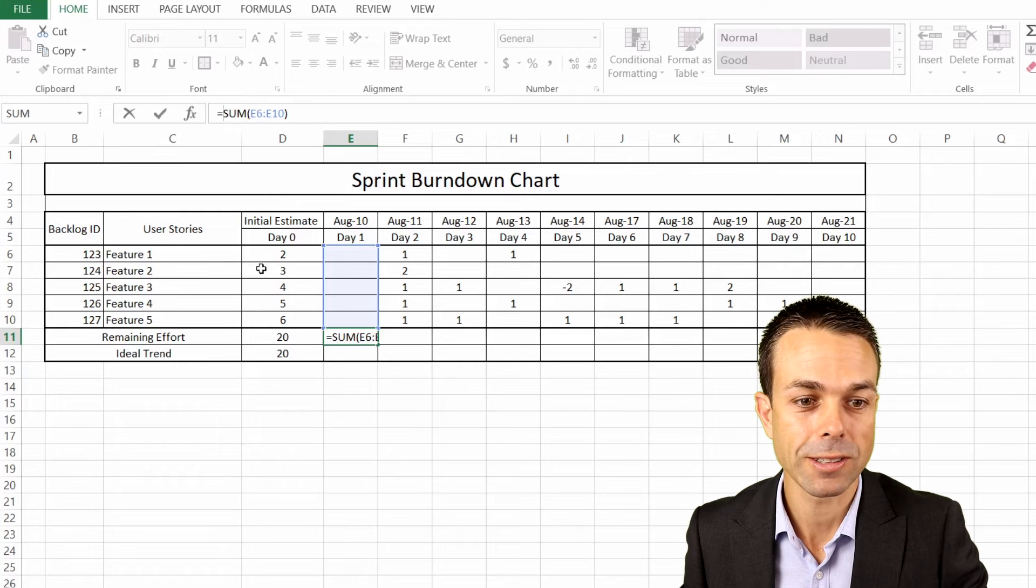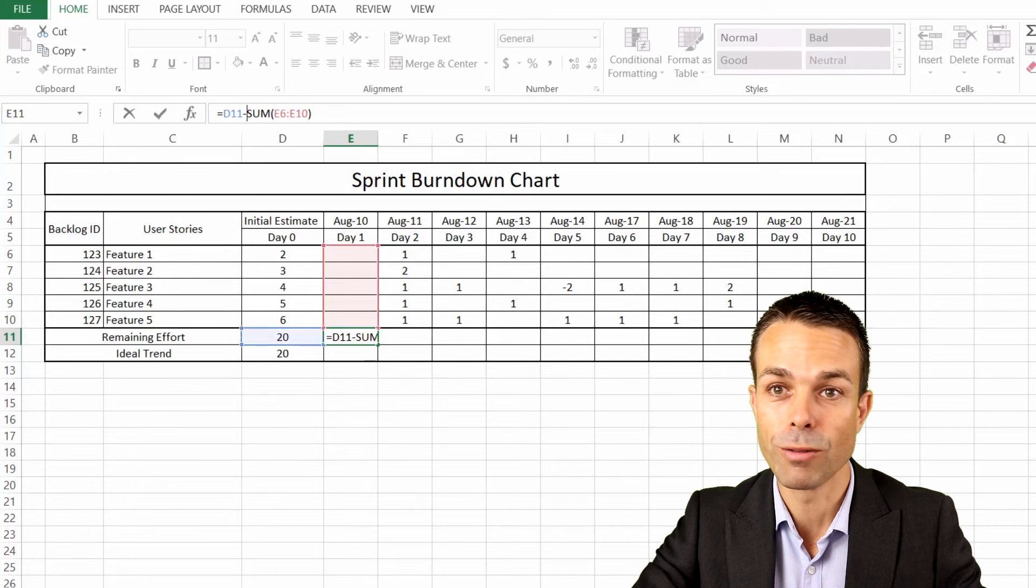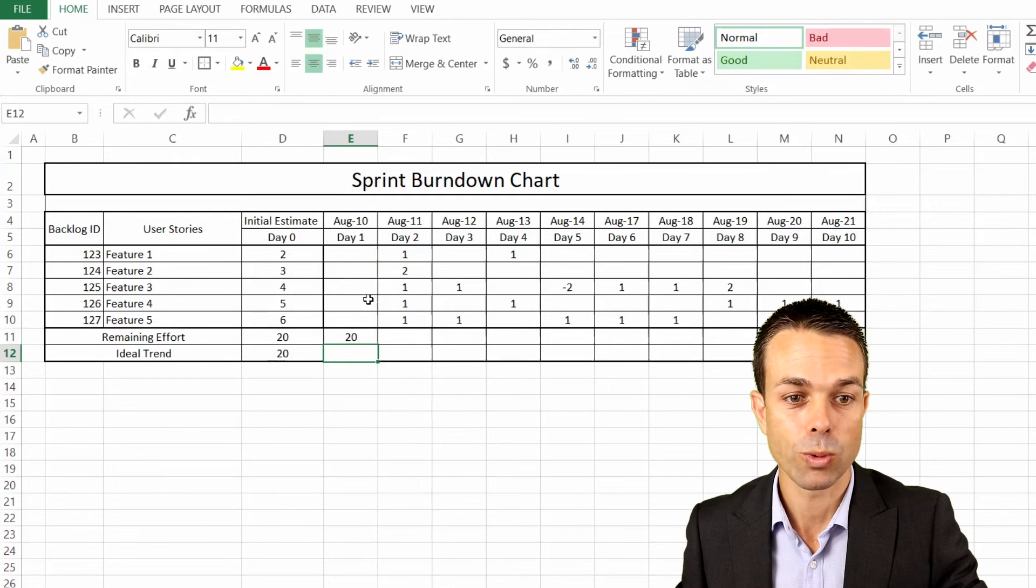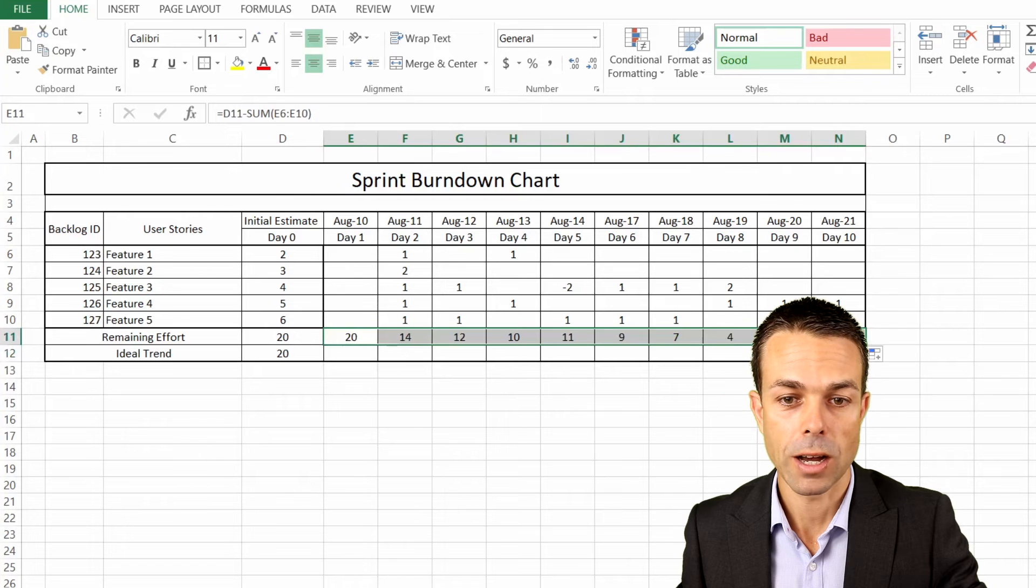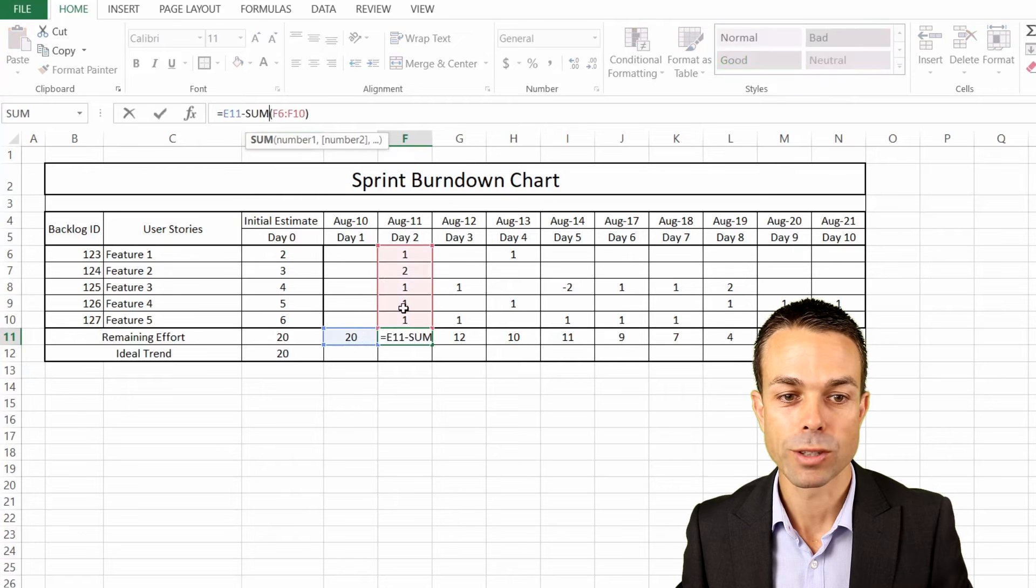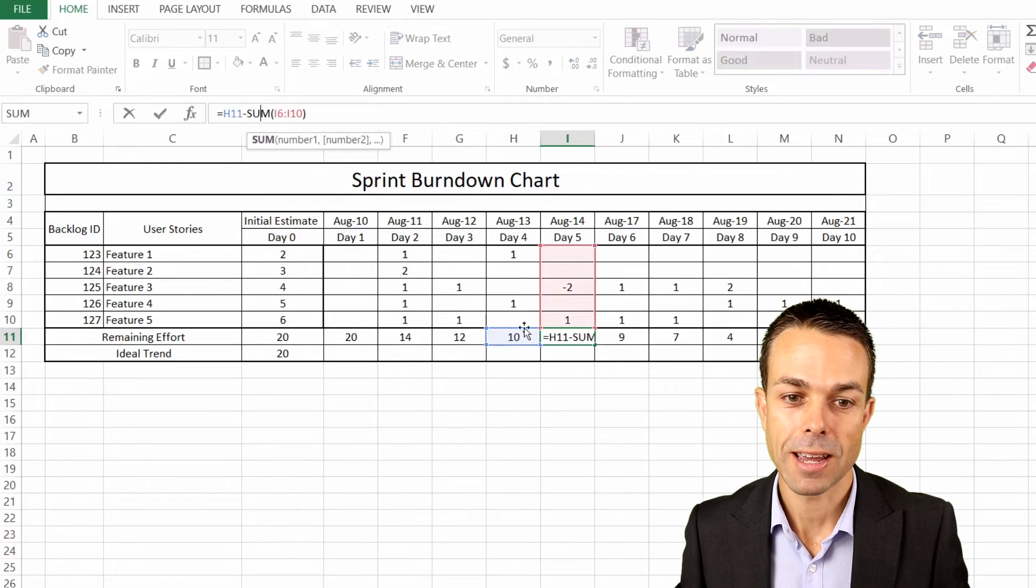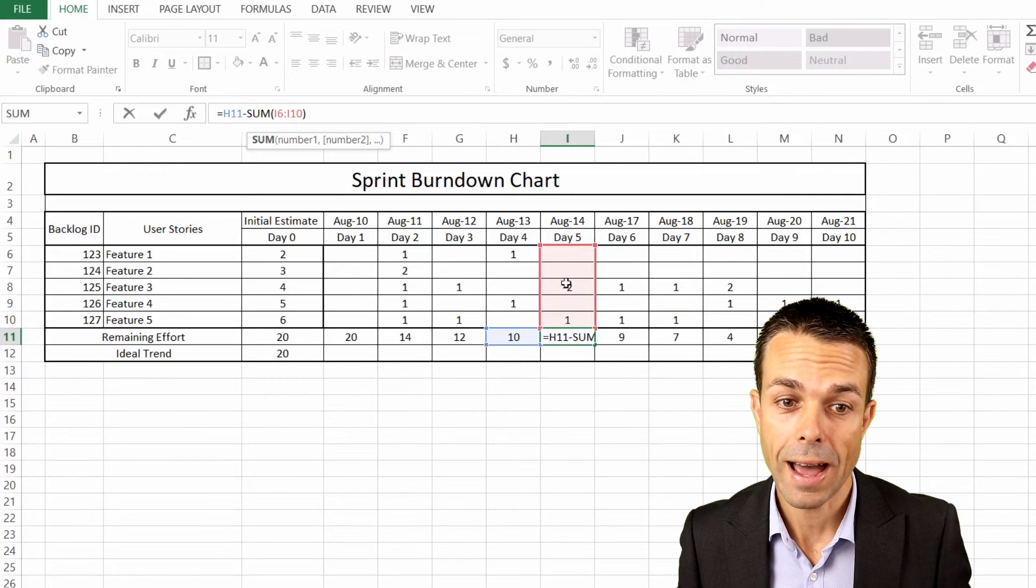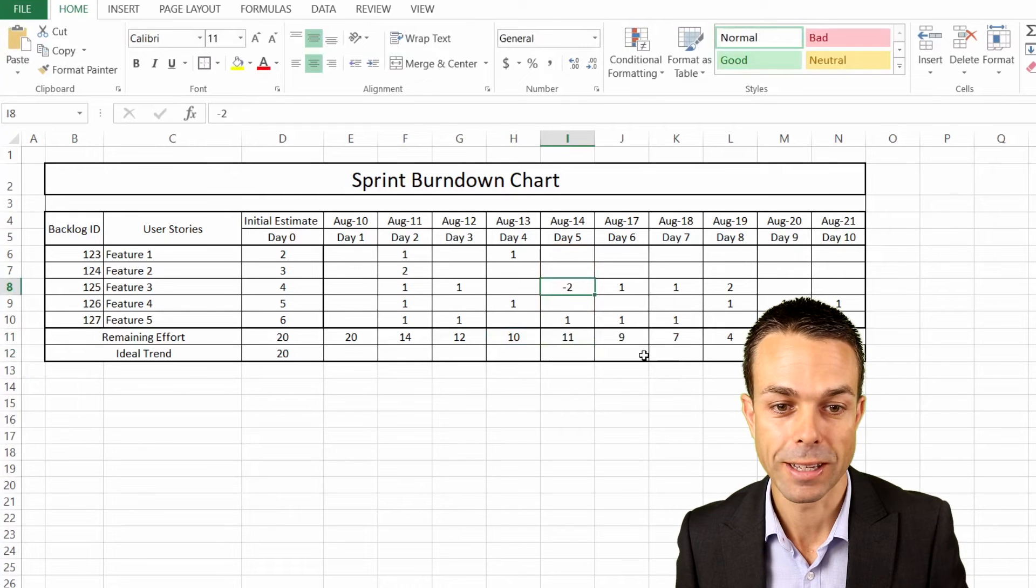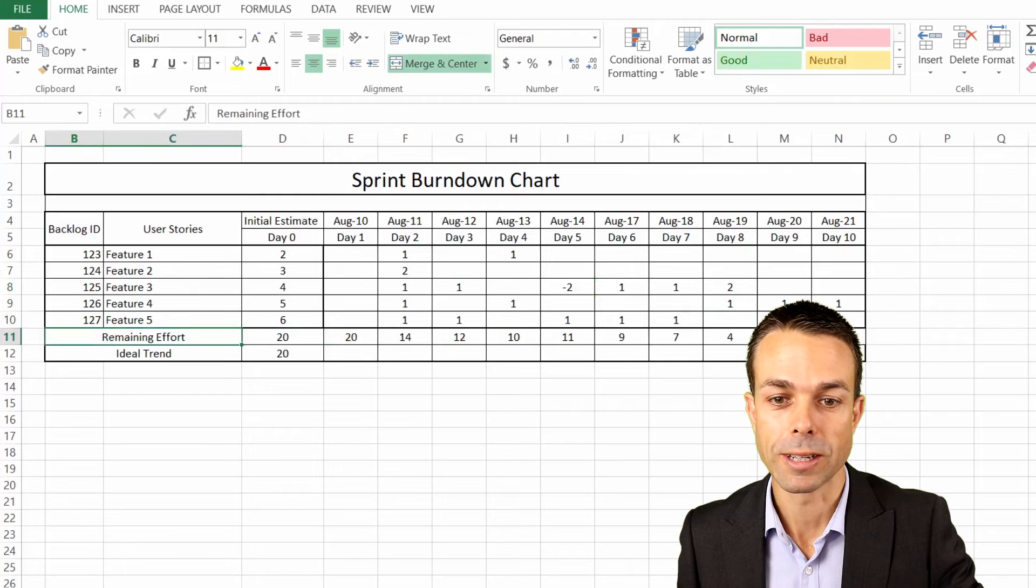So let's try that. The first one is 20 because we haven't done any effort. And then if we drag this across, hopefully it will match up. Great, that's fantastic. It takes each cell and it moves it across just one every time. It's taking the previous day and then minusing, taking away all of that effort that we've done for that particular day, or adding that effort if we've had to add some effort. So that's our remaining effort. As you can see, it goes all the way from 20 down to zero, which is what we're wanting it to do.